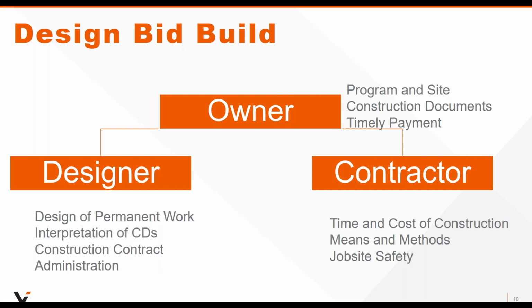And the Supreme Court basically agreed with the contractor, and that the contractor is indeed bound to build according to plans and specifications, and they're not responsible for the consequences of defects in the plans and specs. So that means that the owner is on the hook. There is an implied warranty that they give to the contractor when they give them the construction documents. You as a design team are just held to that standard of care. And you may well have met that standard of care, but the construction documents may not be sufficient. That gap is on the owner.